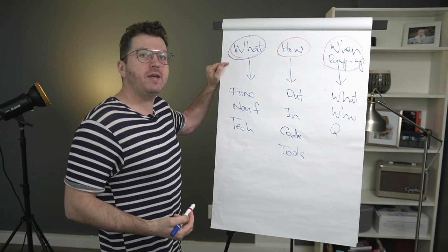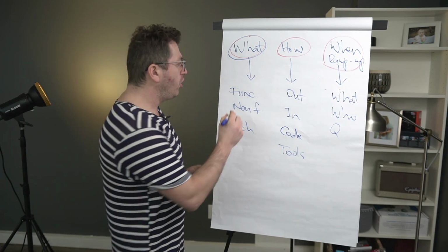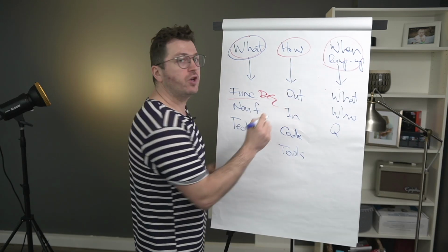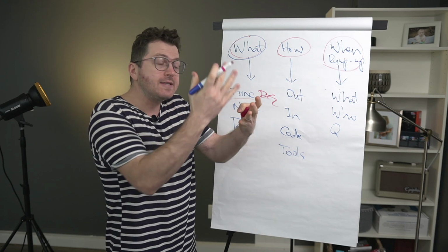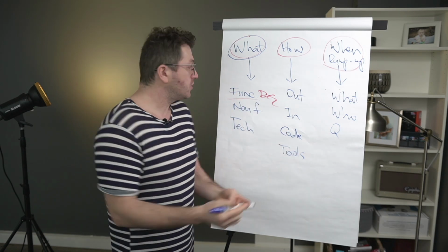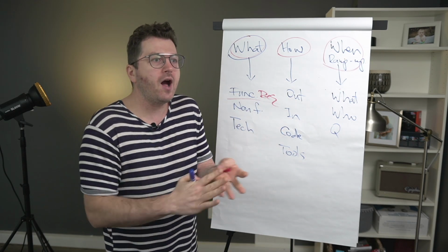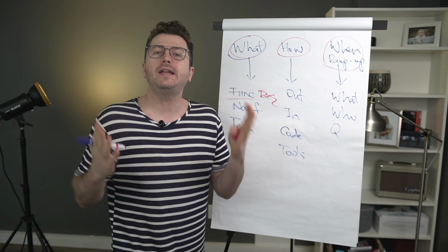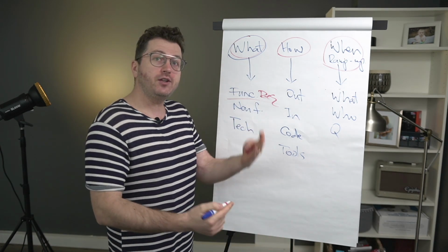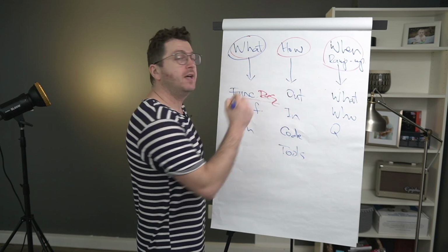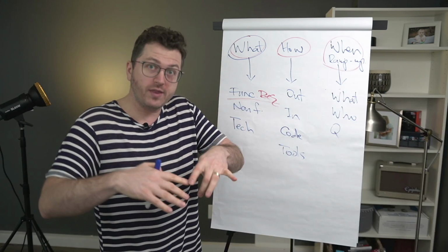So the first one, what is being built? In a nutshell, we need to make sure that all the functional requirements are documented. That means, how is a user that is using our product, what is he able to do inside of our product? So those are the functional requirements. You need to have them in Google Documents or in Jira or in Aha or in any other tool, it doesn't matter where it is, just have a document accessible via a link, and make sure that you have somewhere a list with all these requirements and the description about them, anything that is relevant to it. Now, ideally, you create this when the product is being developed, right?